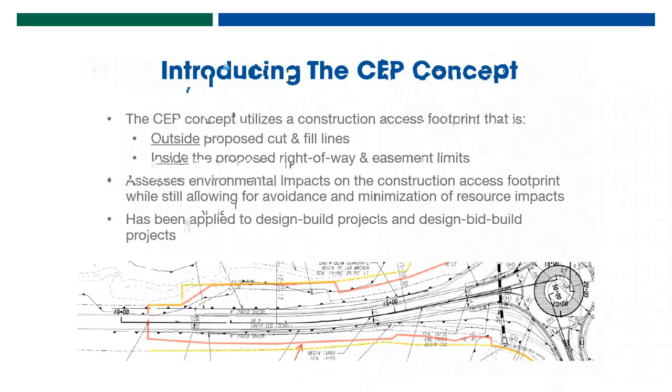We've demonstrated that it can be done effectively, and we've even demonstrated that by anticipating, say, additional riprap that would be required for District 1 bridges, if we anticipate that even moving forward and get an acceptable plan, we still demonstrate avoidance and minimization, we demonstrate the need for the riprap, we get the permit for it. Well, lo and behold, at least in one example, there were post-lockdown changes. They did stay within the construction envelope, and we did not need to re-permit that project.